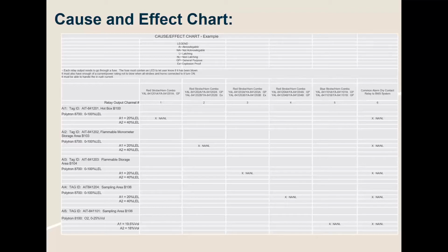Yeah, and I would say, certainly, Steve, the piece that I would take away from that the most is all too often we get asked at the end of a project, hey, can you help me write my SOP? And we're trying to point people to do that early on in the process, because if you wait till the end, you're going to forget something critical that someone needed or something critical that had to happen, and it can cause some costly changes for sure. And again, this is where hiring a good engineering company can really help you make sure that you think through some of those things.